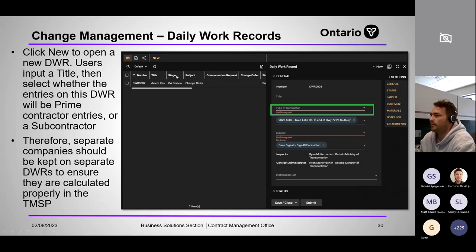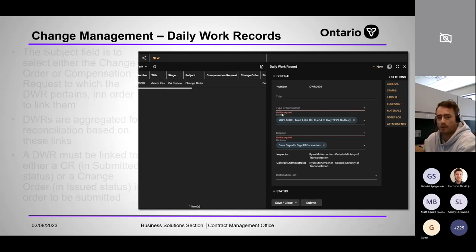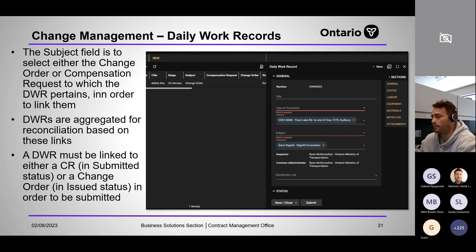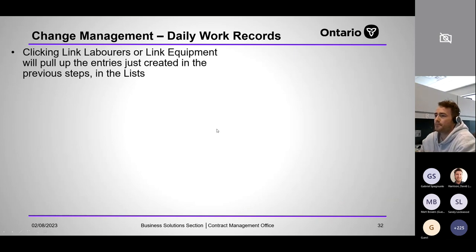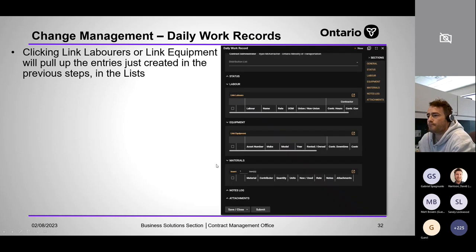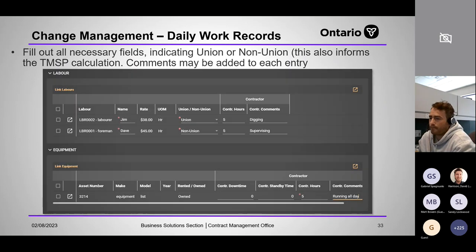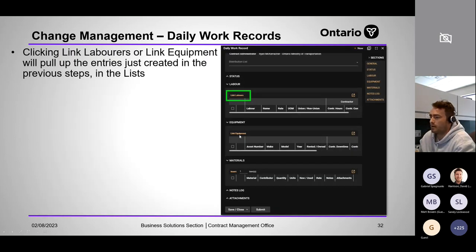Moving on to daily work records. Click New — you've got the type of contractor field: prime or sub. That tells the system how to handle it in the TMSP. For prime, you'll also indicate union or non-union. You then link laborers, link equipment, and for materials you just insert a line and type the material directly. The link labor function pulls up the labor list we just reviewed.